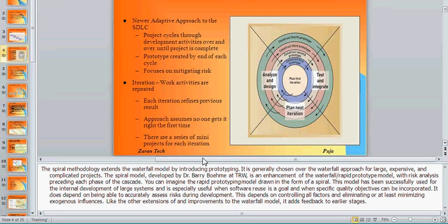It is called a spiral because we go in loops. We finish one, we go into another loop. And in every iteration, we plan the iteration, gather the requirements, analyze, develop, integrate, and then get customer feedback to plan some more. So it can go into loop 1, a second loop, or loop 3, until we feel that the customers are happy. Everyone clear so far?